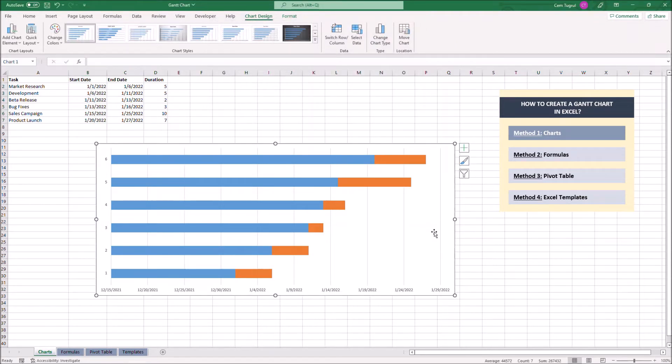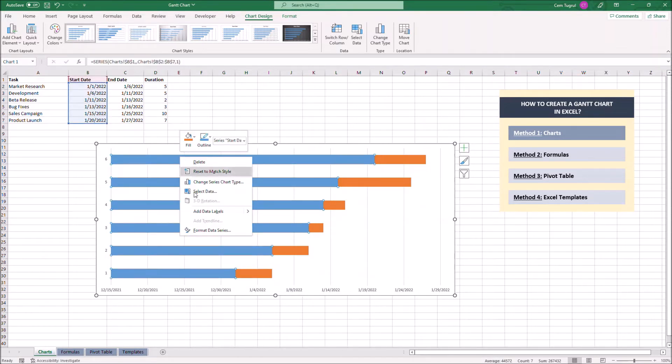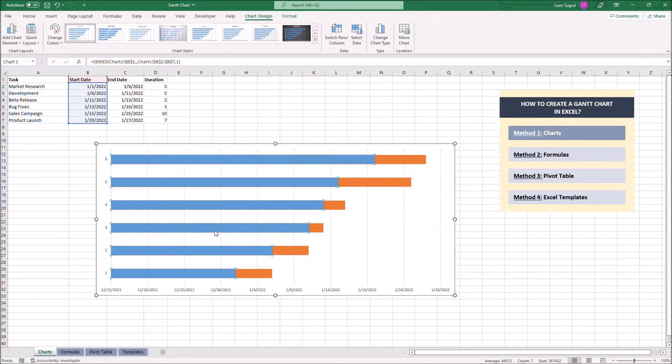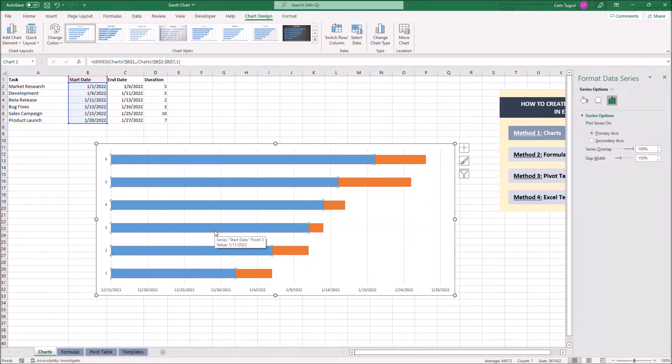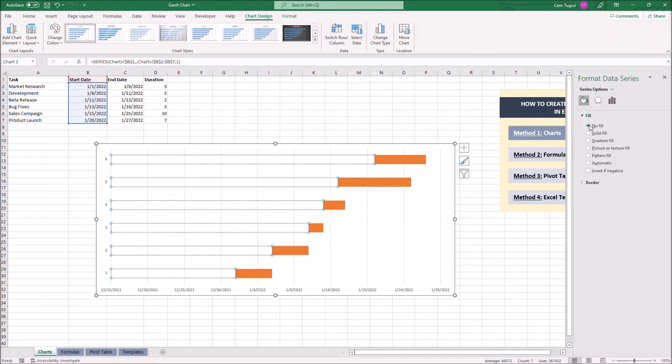Now we want to get rid of our start date data. Let's click on start date, right-click, format data series, click on the fill and line button. Let's click on fill. We can select no fill here.